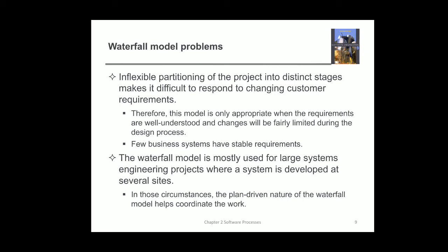Therefore, this model is only appropriate when the requirements are well understood and changes will be fairly limited during the design process. Few business systems have stable requirements. Only a few of the businesses that we have have stable requirements. In that case, we can go with the waterfall model.